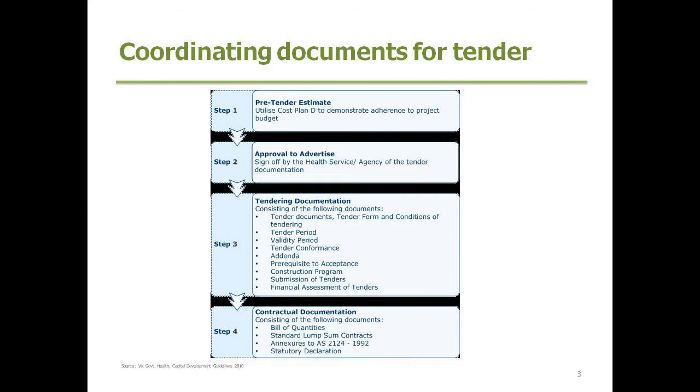Documentation procedure, really important part of the process. The tender documentation itself needs to be clear and concise. All of the tender documents are important when coming to finalise the tender, and what I've often done is kept a schedule of all of those particular types of information, tender documents, contract drawings, the amendments, special conditions and so forth.